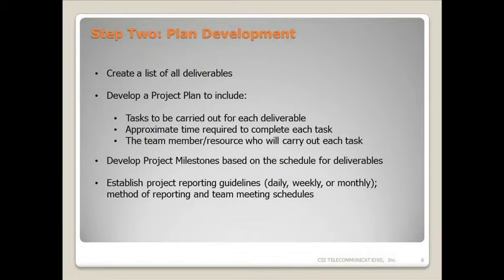So we create a list of our deliverables, and then we need to develop the project plan. And the plan is really based a lot around what are the deliverables and when you expect them to be completed. These deliverables come from that needs assessment. So you need to break down the tasks that are going to be involved.